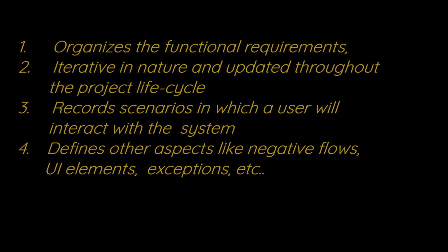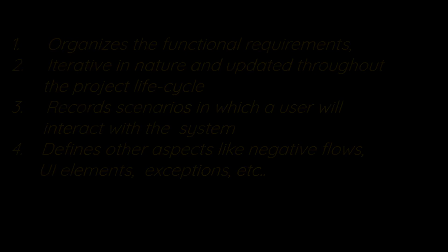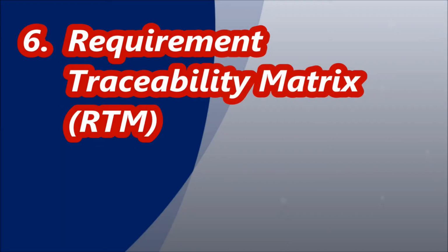This is done by maintaining an Excel sheet which lists the complete user and system requirements for the system in the form of use cases, which are in turn mapped to the respective documents like functional requirement, design document, software module, test case number, etc. An RTM is maintained throughout the life cycle of the various releases in a project, and it's a vital document to track project scope, requirements and changes in any project.